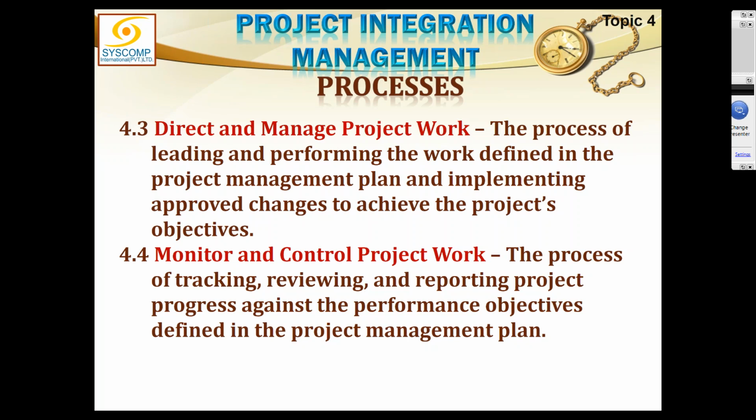If you do not get confused, I'll just explain. There are 3 baselines: scope baseline, schedule baseline, and cost baseline, and putting them all together in a project management plan gives us a 4th baseline, which is called the performance baseline. So complying with scope, time, and cost means you are complying with the performance baseline.